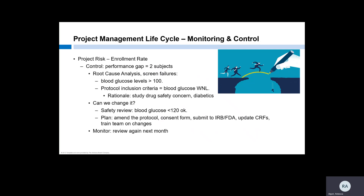But it is worth asking: can this criteria be revised without impacting patient safety or study integrity? Let's have the experts review. The Data Safety Monitoring Board looks at it and says that we could safely increase the inclusion criteria to up to 120. The team makes a plan to amend the protocol and study documents, submit to FDA and IRB, and train everyone on the changes. Next month, we'll repeat the process and see if this change has had a positive impact on enrollment.